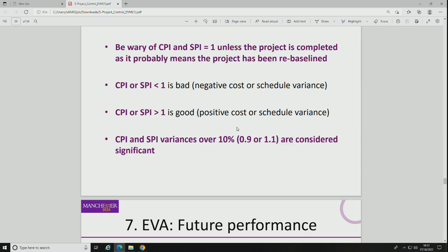But as time goes on, you get this ongoing, almost dampening of the impact of things, because the numbers are getting higher in magnitude. You're dealing with larger numbers, so any changes don't show up as much as a percentage of the other. So as you go further on in the project, if you track it around one, as these ratios go up and down, they will diminish in pronouncement. You've got to be aware of these subtleties.